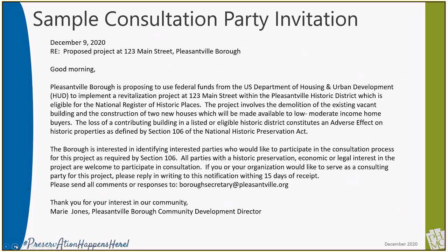The consulting party invitation should include the project name and address and description, a brief explanation of the Section 106 process, including their possible role as a consulting party with an interest in the project, a description of the potential effect of the project on historic properties, contact information for future correspondence, and a set date requesting a written or email response to the invitation to consult.